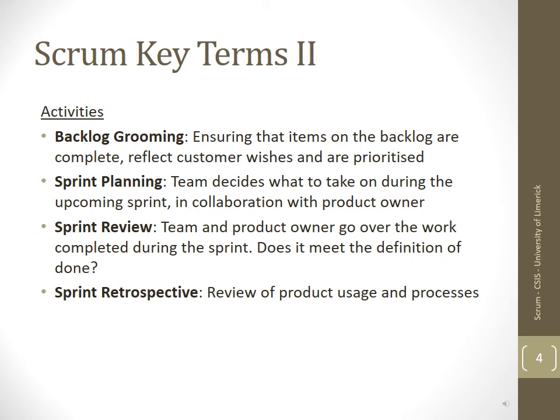Rather than that, if you think of a traditional project, you would have a post-mortem meeting after the project, or maybe after some milestones, but there might be months or years that pass before you have such a thing, and then you feed that insight into a next project, right? But it might be a different team that is doing the next project. So this way the teams become better quickly, or that's at least the idea behind it. And that happens in the sprint retrospective. The sprint review is more about working with the product owner and looking at what has been done. Then in the retrospective, you look at how well the team is working.